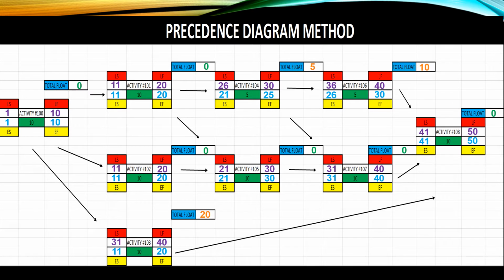When we were using the PDM diagram earlier, I had to calculate everything out by hand, but when we're using any kind of CPM-driven software like Primavera P6 or Asta Power Project, these calculations are done for us, making everything a whole lot easier and more accurate. The PDM diagram and the Gantt chart are essentially the same thing, but they're structured a touch differently.